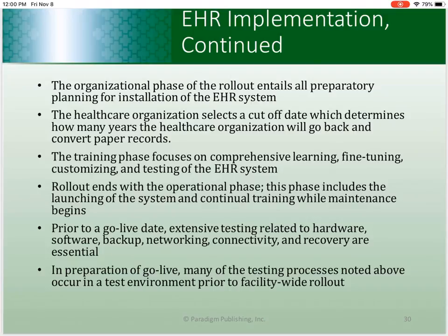Instead of rolling that whole document out across the whole facility, we may start that pilot on one nursing unit. So 6 South may be our pilot floor, and they may test the new note. Basically what you're doing is trying to identify any issues or problems before rolling it out hospital-wide. If we determine, oh God, this is terrible, we can't use this, we've got to go back and tweak this, we've only affected one floor. We've not affected the whole hospital.